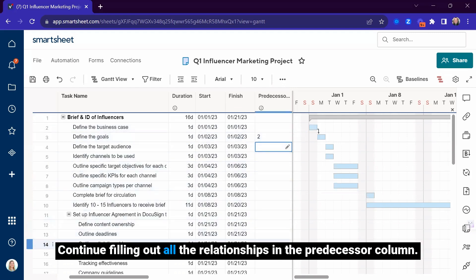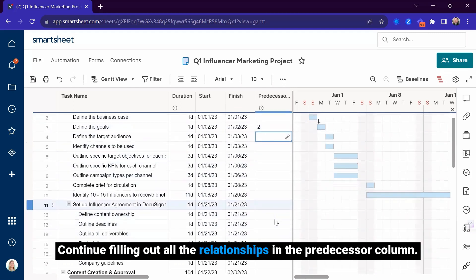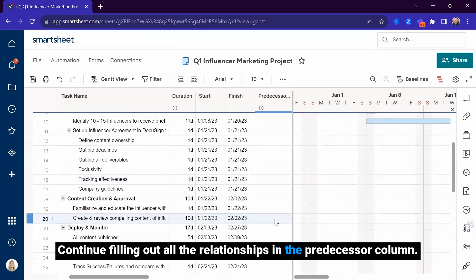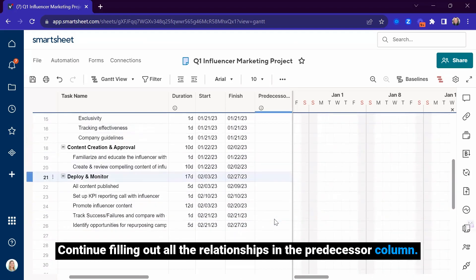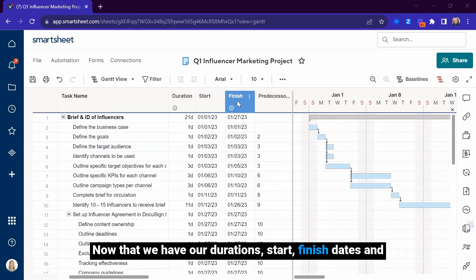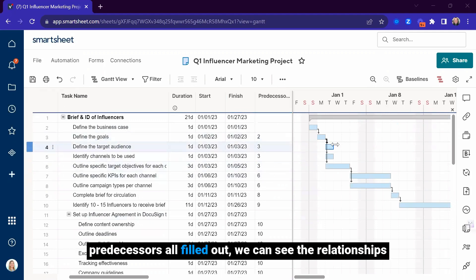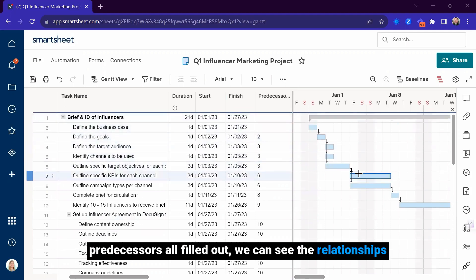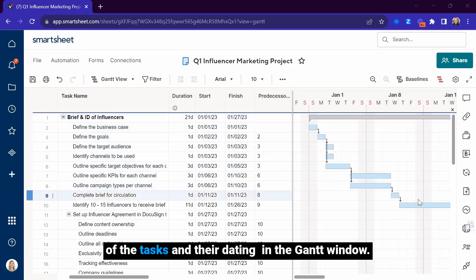Continue filling out all the relationships in the predecessor column. Now that we have our durations, start, finish dates, and predecessors all filled out, we can see the relationships of the tasks and their dating in the Gantt window.